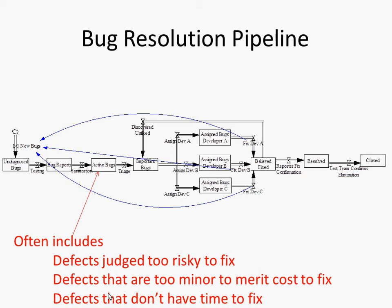There are a lot of bugs which may be high priority but low severity, and some that are high severity but low priority, and some that are both — high priority and high severity. It's during the triage process — T-R-I-A-G-E — that we decide how we're going to marshal our limited resources: limited programmers available, limited software development time, effort, and energy. How are we going to spread that energy around? The triage process involves that exact sort of reflection, and often involves a project manager, maybe a triage lead, maybe the test lead and development lead.